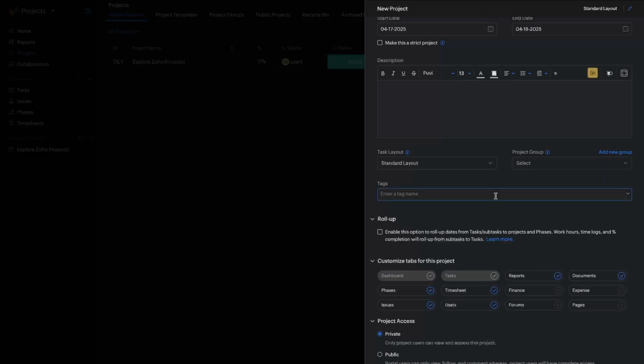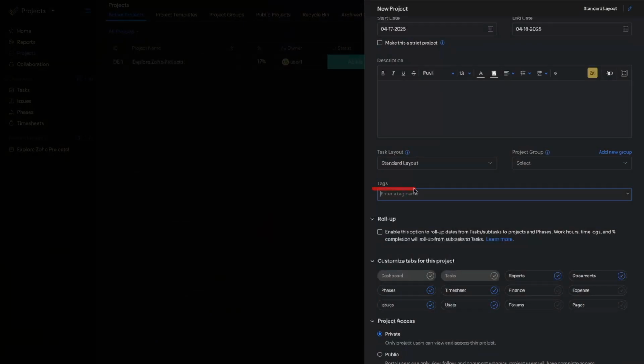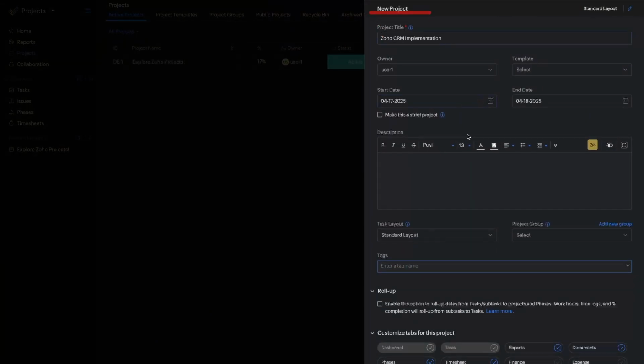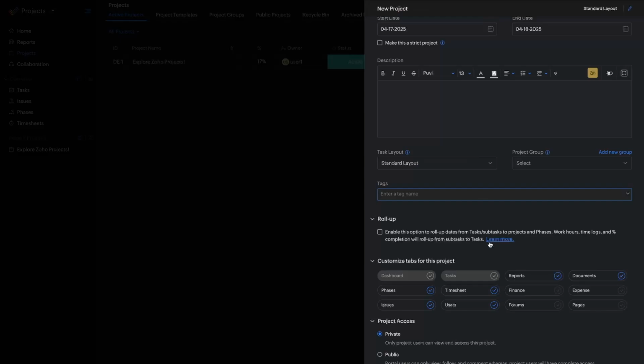Tags. The thing about tags is everyone goes to tags to add a tag to have another way to filter or organize their work. I'd encourage you not to do that as much as you can, because a tag can mean anything. Therefore, it starts to mean nothing over time. People just start throwing tags willy-nilly until it becomes this Wild West where there are 500 tags. It's impossible to organize things and it gets really confusing. So the alternative, if you're going to organize things, is to add custom fields to the project. Using fields is a structured way to store information, whereas tags are unstructured, so it's harder to report on and harder to organize. We're not going to go too far down the rabbit hole on that. I just want to give you a fair warning for tags.